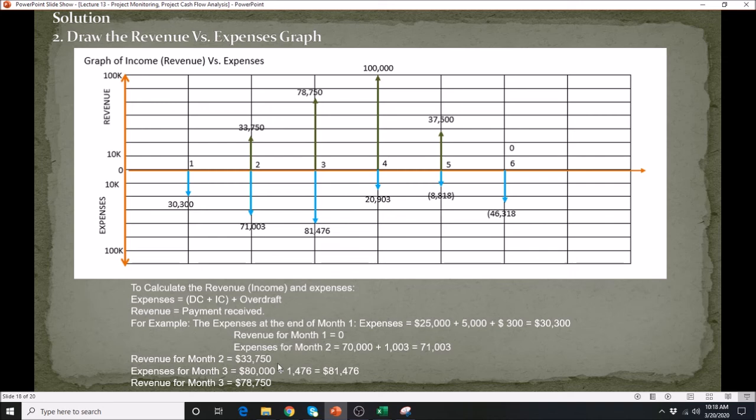For the second month, of course, the revenue for the first month we didn't receive. You apply in one month and you receive one month after you apply, so that's pretty much at the end of the second month. So we have 0 for your revenue for the first month.